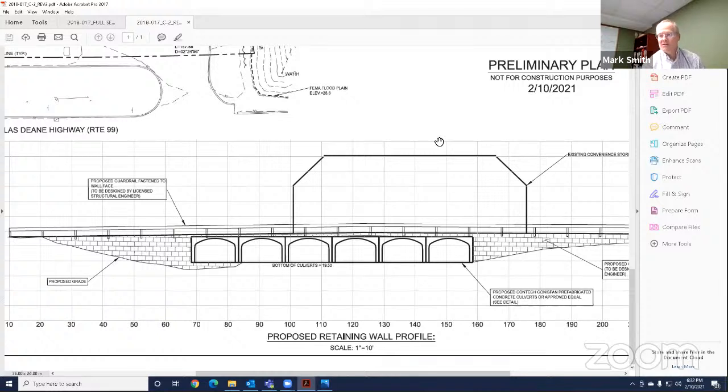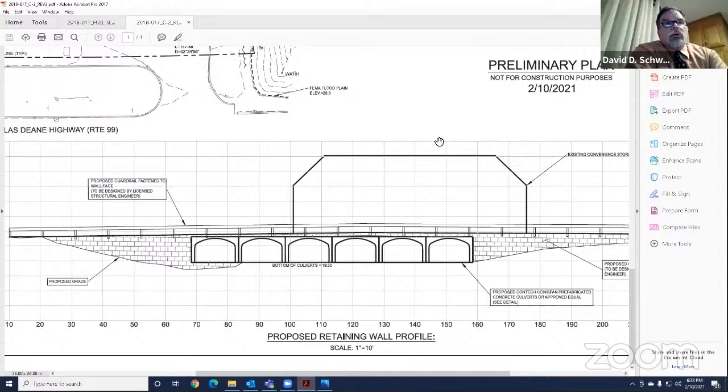And this is something we've been discussing with our geotechnical and structural engineers. We know we're going to have to stabilize the soils, and that's where we aired out the issue of how far beyond these we would need to go with compacted gravel, things that wouldn't be suitable for a wetlands. We're confident that we can get these installed with a temporary disturbance of 5 feet, and then restore the wetlands right up to the face of them with over a foot of wetlands soil mix.